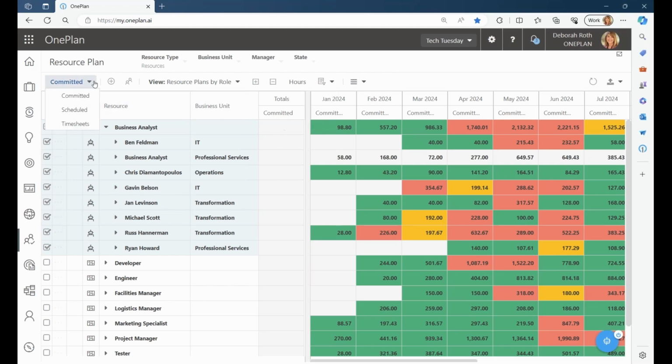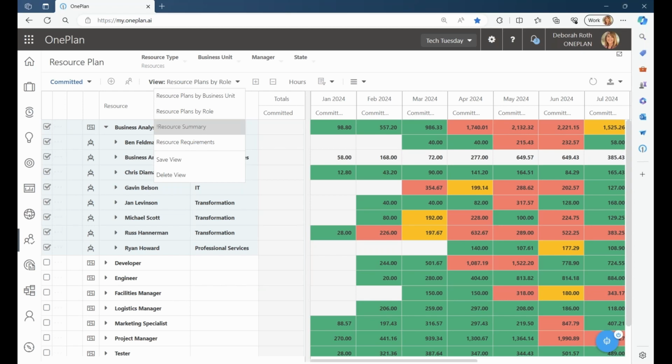But that refers to the predetermined or agreed upon number, like one FTE, one business analyst, or half of a business analyst, or a percentage of an allocation of a particular named resource, that is typically in OnePlan associated with a role. This helps you determine how much capacity you have and the workload that any of these roles and functions can take on at any specific time. That can be assigned to a particular task, a project, or team members within a specific time period.